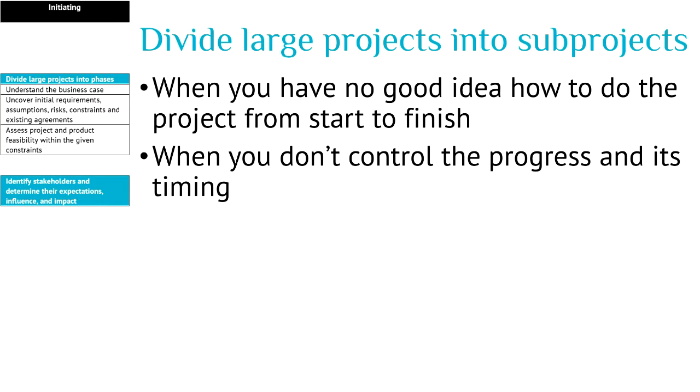The core principle behind this is everything that has been started must continuously progress. That means that your team must continuously work on the tasks of the critical path, and it also applies to the tasks. Tasks that have been started must continuously be worked on to get the task finished.